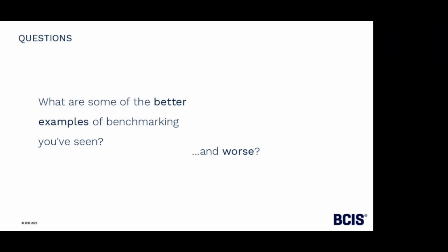It takes time and investment to do this, and over the course of a few months, we started to build that body of knowledge, where we're getting the project's data coming through, analysing it into this standard form that we'd agreed, and we started to get that internal benchmark information coming through. So it took a bit of time, but it then started to percolate through and was starting to be used in estimates.